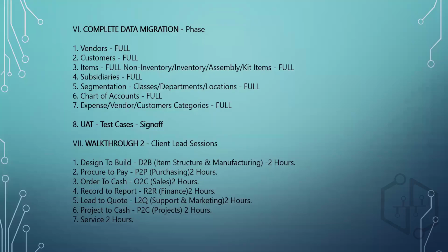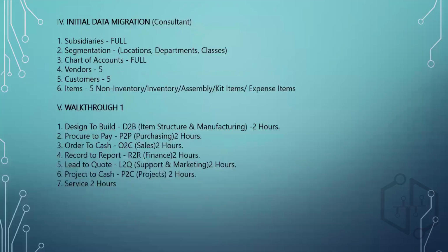And the users actually train their end users. They have to test these UAT test cases, and then they have to do a sign off. Now, after that is done, you have a walkthrough 2. Okay, these are client-led sessions. Now, walkthrough 1 is a consultant-led session wherein we are actually walking the customer through the process.